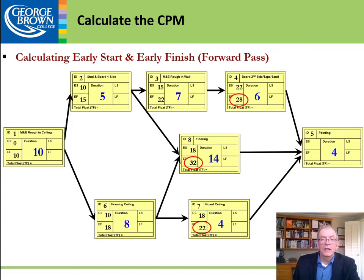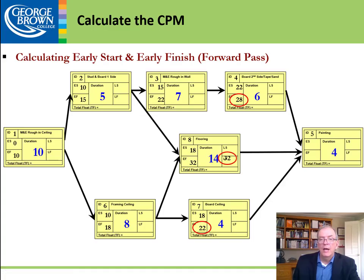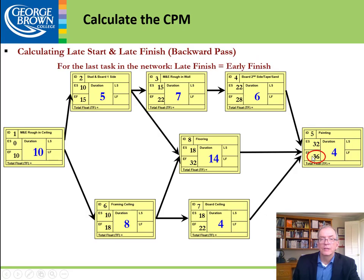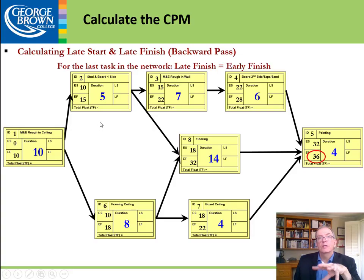We've got merging activities again — 28 and 22 — and we take the larger number, which is 32. That becomes our early start; early start plus 4 gives us an early finish of 36. The forward pass is complete, and we now know this project is going to take 36 days from start to completion.